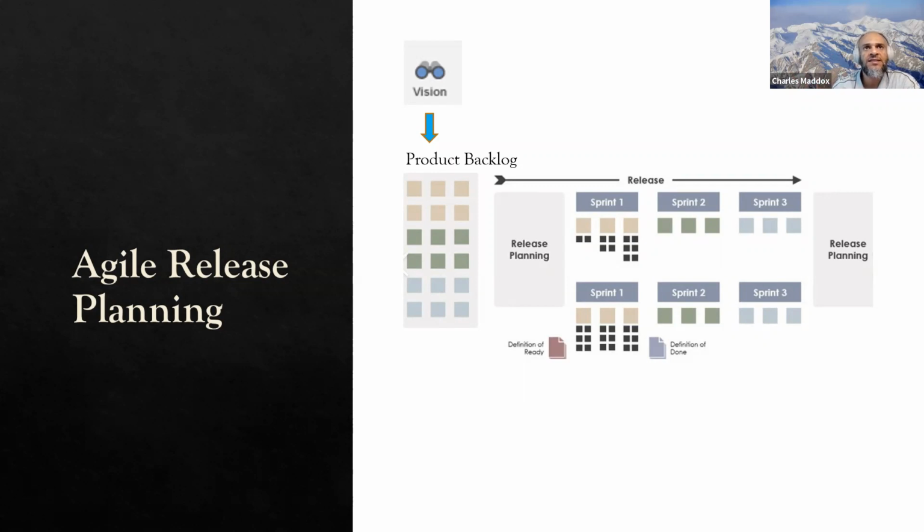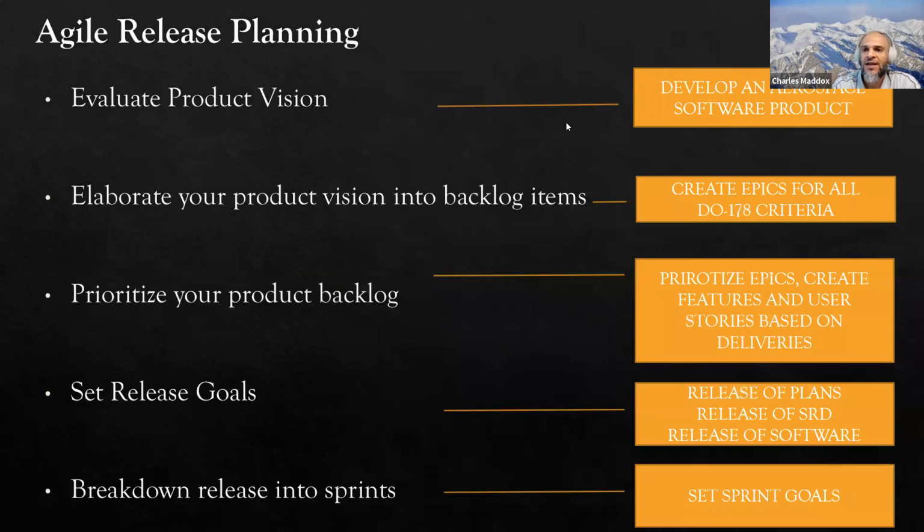That contains the details of the actual deliverables over time and the various milestones we're going to reach as the development process evolves. So it's not all big upfront, it's still iterative, but we use the release planning process to break down that big rock of the project scope up front. That way we can iteratively create our compliance documents and update them over time. All right, Kritika, I'll let you take it over to give a more detailed understanding of how release planning meets these requirements.